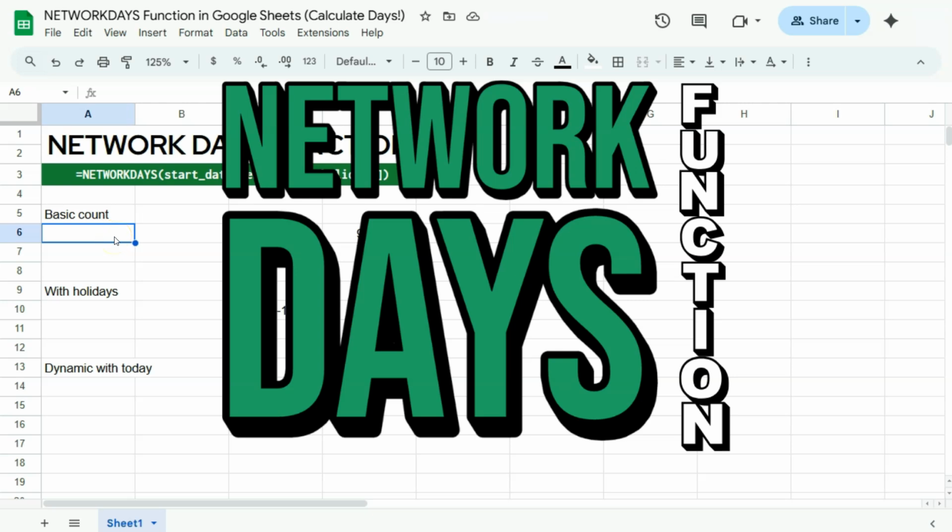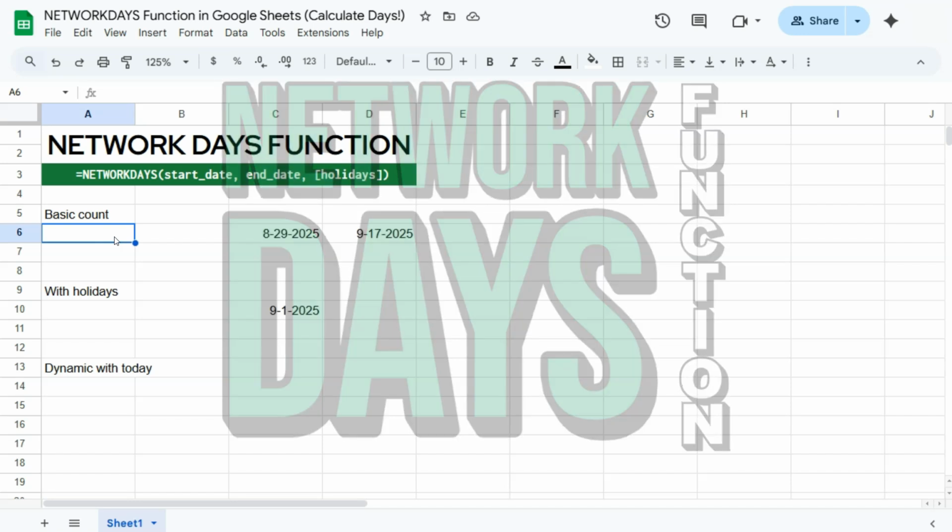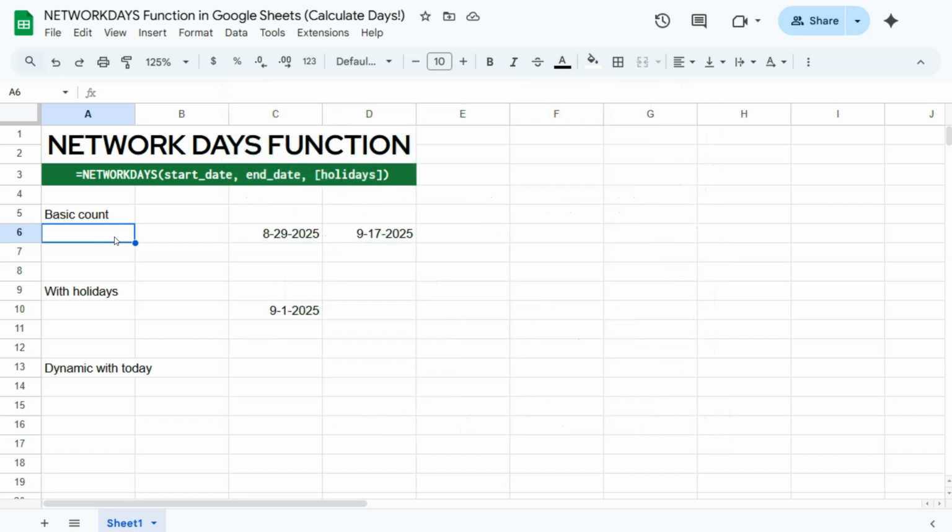In today's video, I'm going to show you how to use the NETWORKDAYS function here in Google Sheets. So in a previous video, we've actually talked about the WORKDAY function, which gives you the end date after a number of working days. But our NETWORKDAYS function does the opposite. It tells you how many working days there are between two dates.